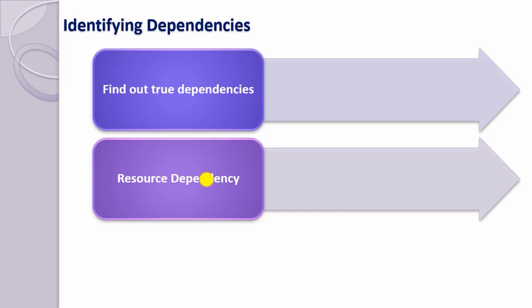In such cases, it's important to have the documentation in place, and you can ask your management to get a resource on a temporary basis and get him or her a mentor. Another example is large projects, such as the re-framing of an ERP. It's always important to divide the work and attach one resource to the core person, so that the knowledge does not go with them. In the IT industry, the attrition rate is very high, so it's very important to identify the resource dependency and deal with it accordingly.